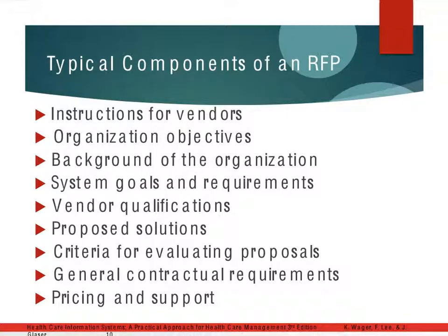We may identify some of our own proposed solutions. We'll give a time frame for evaluating proposals and specific criteria relating to it. We have to articulate what our contractual requirements are, and that's going to be specific. That's something that you're going to have to work with your legal department on. And you may include budget information in that piece of your RFP.